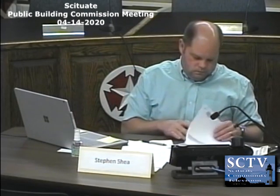Are there any questions or anything to review on the invoice from the board? This is Ed. I have a question. Is their construction phase invoicing going to be spread out right through the end of the project, or are they going to be paid in full before construction's finished? No, they're already at 30% and we're just doing foundations. It's spread out, and they're in the process of doing all the submittal review right now. So in reality, a lot of their work during construction administration is now. As we get towards the end, there'll be some more submittals, but it won't be the deluge that they have now.